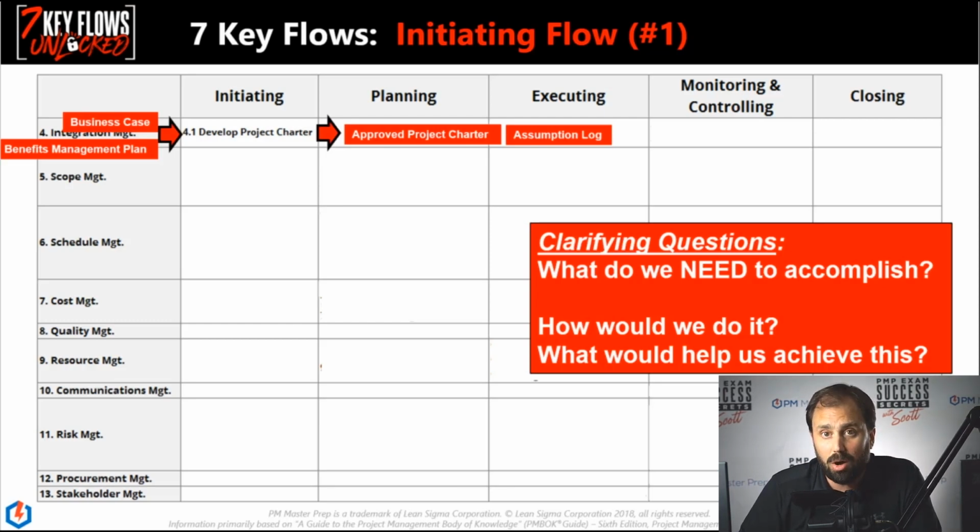Now, it's important to know those because as we get into the project, we're going to make decisions based off those. And if we find out that those assumptions are not dead on, what do we do? Well, we update our assumption log. And then we use that to better inform our project sponsor and our stakeholders that we might have to adjust our project in time. But we got to have this assumption log running. So awesome. Deeper alignment is what we're going for.